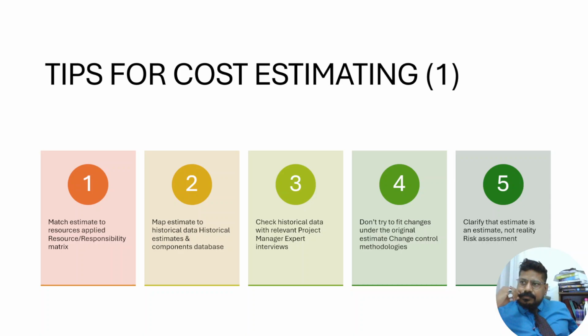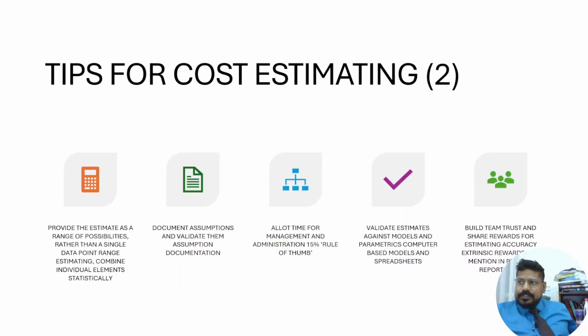Plus, there should be a plus minus of 5 to 10%. On a higher side, you can say 12% as well, to give you some breathing space. But then please notify this and please document this.